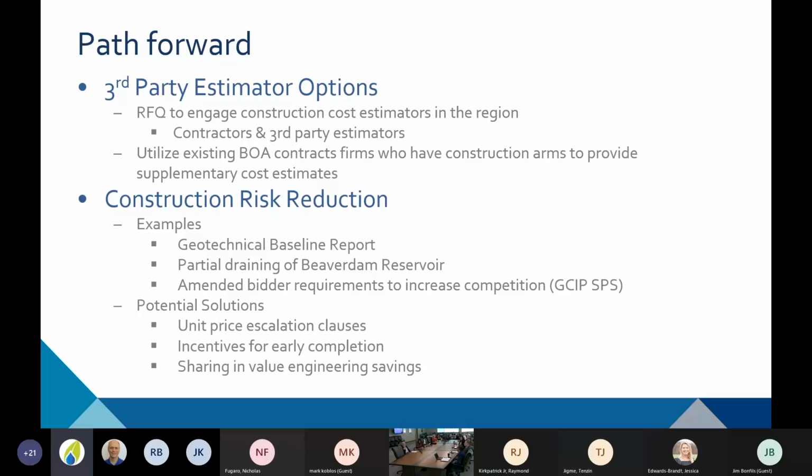That's a mixed bag, right? Because the minute you do something that delays him, he now has a claim that you're hurting my incentive for early completion. So I'm not sure early completion is a great idea. I think it leads to more claims on a construction contract.